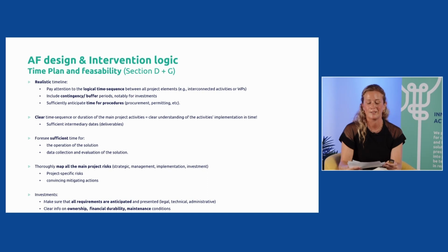A realistic time plan is not only about planning sufficient time for project implementation, but it's also planning sufficient time for the operation of the solution as such. If your project is about delivering a building, well, the delivery of the building is not the whole solution. What we want is to test innovative solutions, so the full solution, which is the delivery of your building, plus the activities that are hosted there, and that makes the solution innovative. So please always make sure that the operation of your solution is integrated in your time plan as well. And you should anticipate as well the time for your data collection and the final evaluation of your solution.